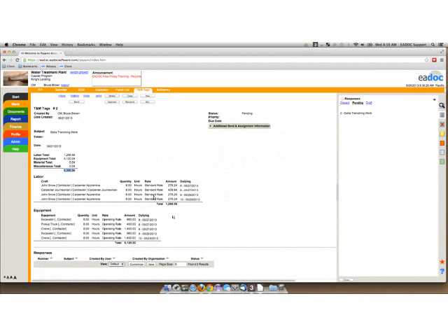So it's a great way to keep track of costs that you were not anticipating that aren't linked necessarily to a schedule of values item that are extra work. You can open up a time and material ticket and have your inspector tie all of that work to that time and material ticket and see exactly how much it's coming up to. Okay, so that kind of covers the two places that you would also use data from your daily logs.